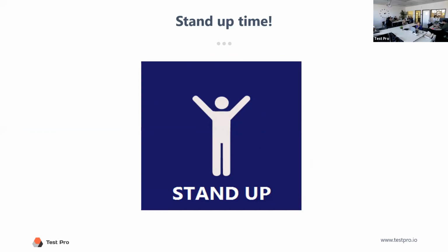In my company, in pretty much all agile Scrum meetings, we do a stand-up, and it literally is what it is. It's a 5-minute stand-up, and the teams that are involved get in a room. Usually your Scrum Master, the person who's organizing the coordination of that project, will say, hey, we're going to meet every morning at 9 a.m. and everybody's going to tell us what they did yesterday, what they're going to do today, and what's blocking them, whether it's a defect or whatever that's preventing them from completing something.